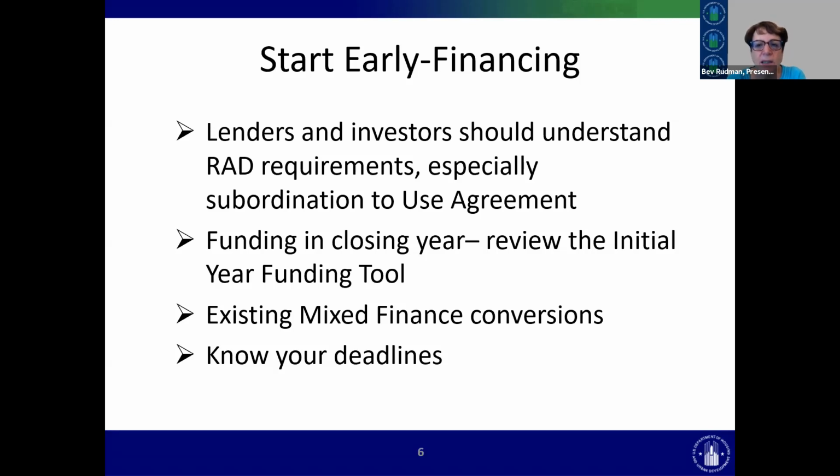So there are deadlines that will blow everything up. There are deadlines that will cost money. There are deadlines that can be met with something other than an actual full closing. So I would say again, before you get to the closing process, the better you understand your deadlines, the better we can all work together to meet them.